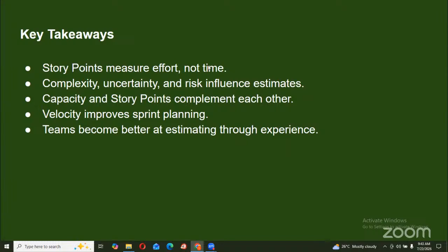Okay. Story points are a relative estimate of the amount of work, the amount of effort that is going to be put in to finish that user story. We use the Fibonacci scale. You already understand what a user story is, so for all these user stories, we are going to assign story points to them. Story points are the amount of work we need to put in to complete that user story, where you select whether we give it 1 point or 2 points, based on checking all the factors we've listed: the complexity, the uncertainty, the risk, all 5 factors. You look at it and then agree with your team.